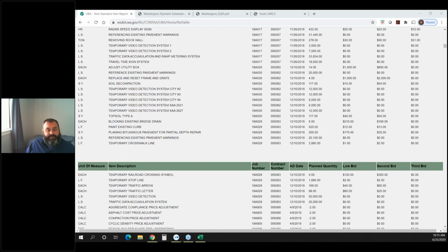The amount of projects in your area can really affect your price. So if a contractor is hurting for work, they're looking for work, they will bid low because they want the job to keep the income coming in. But if they're flush, they're fine, they're going to bid high just to say, yeah, we'll do it if you pay me enough.